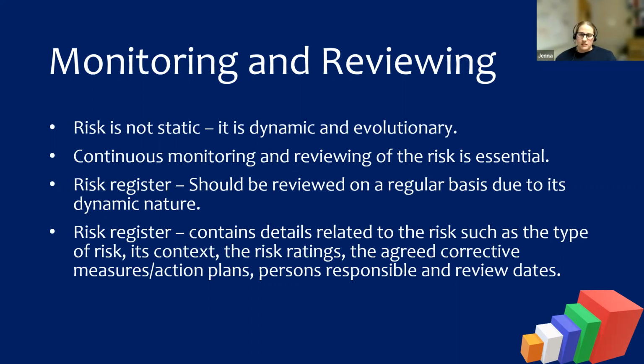So every 3 to 6 months, because in my position now, I am responsible for reviewing risk management, I look at every single element on my risk register and review that risk to make sure: are the controls that we've got in place being effective? Do we need to do something else? Or have we met our target risk? And therefore, maybe I can look at removing it off the risk register.